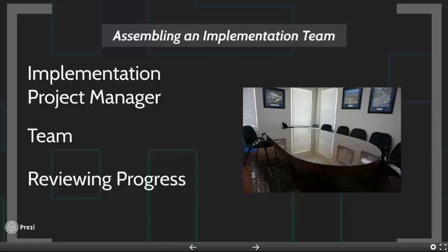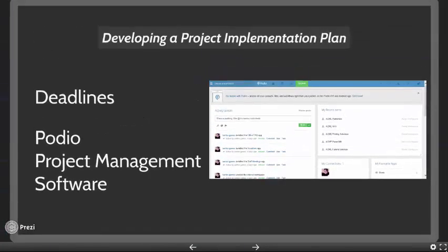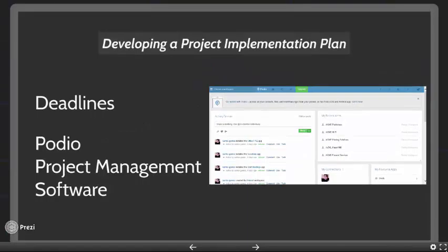Also, when assembling an implementation team, appointing a steering committee is important, which will establish that internal meetings will be daily and weekly. With the client, they will be monthly. And also the team to check the work done by the drafting department will be the project manager and the senior drafting technician.